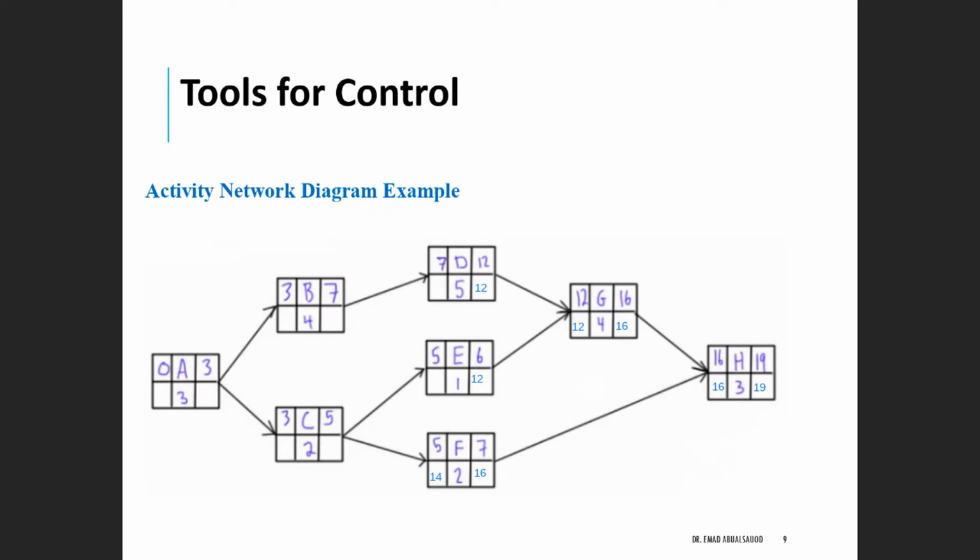So we type 5 here and 11 here. Now, moving on to activity B, we will come to C after we finish B. So moving to B, we will have the same latest finish time from activity D transferred to activity B, which will be 7. And when we subtract 4 from it, it will be 3.